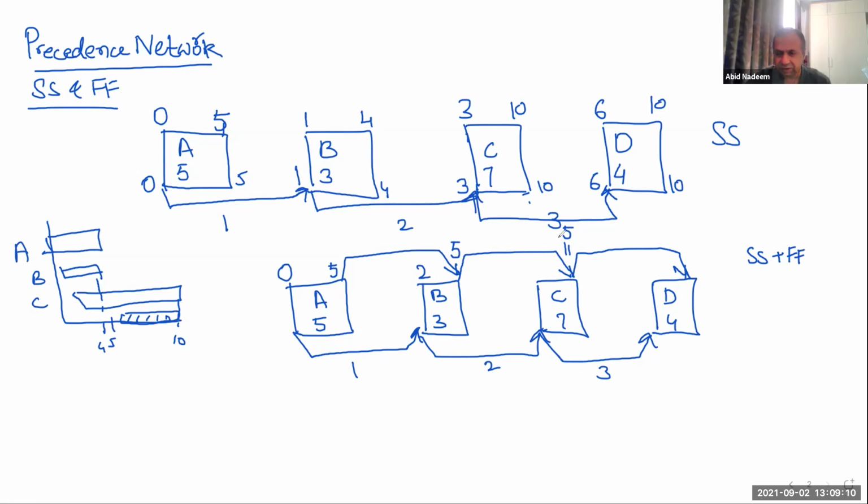We take the higher value, 11. So 11 minus 7 is 4. We can check that 2 plus 2 is 4. Okay, that is fine.